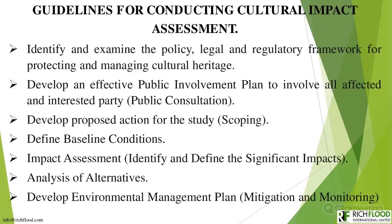Basic technical information and data to be considered include: the location of the project, land requirements, the need for ancillary facilities, construction and implementation schedule, size of the workforce during construction and operation phases, facility size and shape, the need for local workforce, and the kind of resources required. This scoping also covers the cultural variables earlier discussed, so as to know the nature, design, and capacity of data gathering needed for a holistic assessment of the culture.